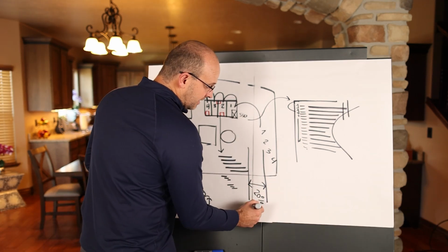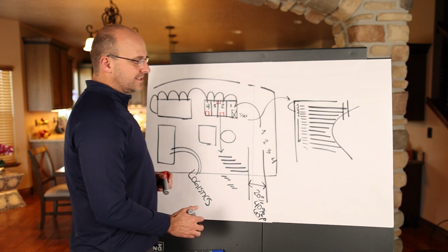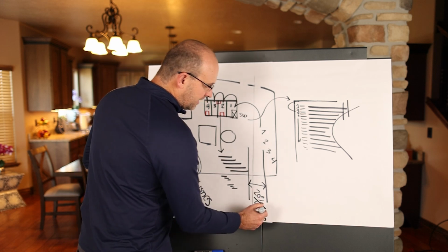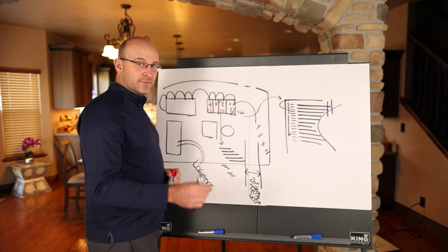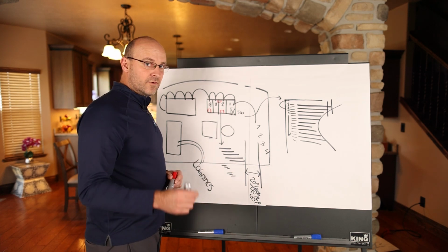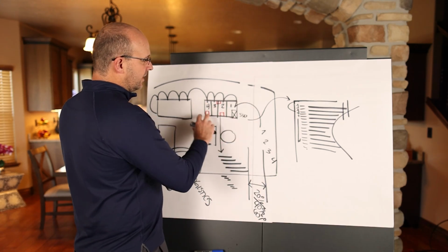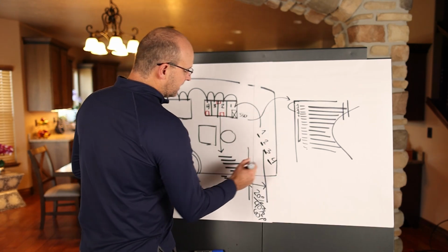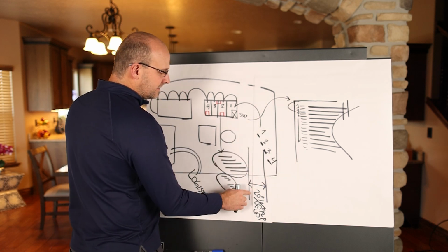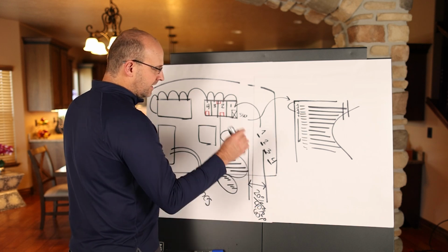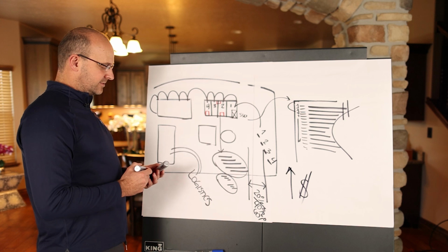In Germany, they're seeing up to 40 and 60%. Now, candidly, with our United States clients, we haven't gotten there yet, but at a minimum, we're at 10 to 20%, shaving off the end and increasing the productivity of these project sites over and over, and people are making a boatload of money. So when we piece this out with the right zoning, we package the trades properly and level them, we have the right number of zones, we're able to create a schedule that can at least get up to 10 or 20% shaved off the end, which makes you more money as an investor. That's absolutely key.